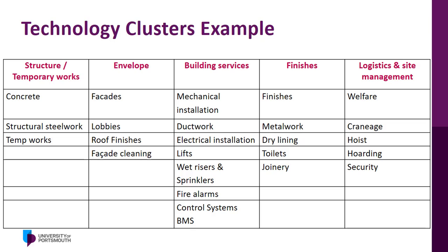This is an example of project technology clusters. This was a 21-story office building that is composed of 6 large cubic shapes stacked on the top of each other, asymmetrically, and rising up as a series of garden terraces. This shape added to the complexity of the design and construction of the building. Example, the directions of the services change every few floors when the building moves up from one cubic to the next. This project and other complex projects we looked at group the STCs into teams of interrelated technologies.